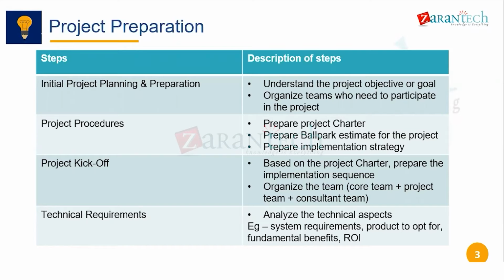There can be complex ones, for example, for the India implementation, generally we take around 6 months. Why? Because we have a very complicated taxation system which has to be configured in the system. There are also different rules on which cases need which types of taxes, and different rules of revenue recognition as well.